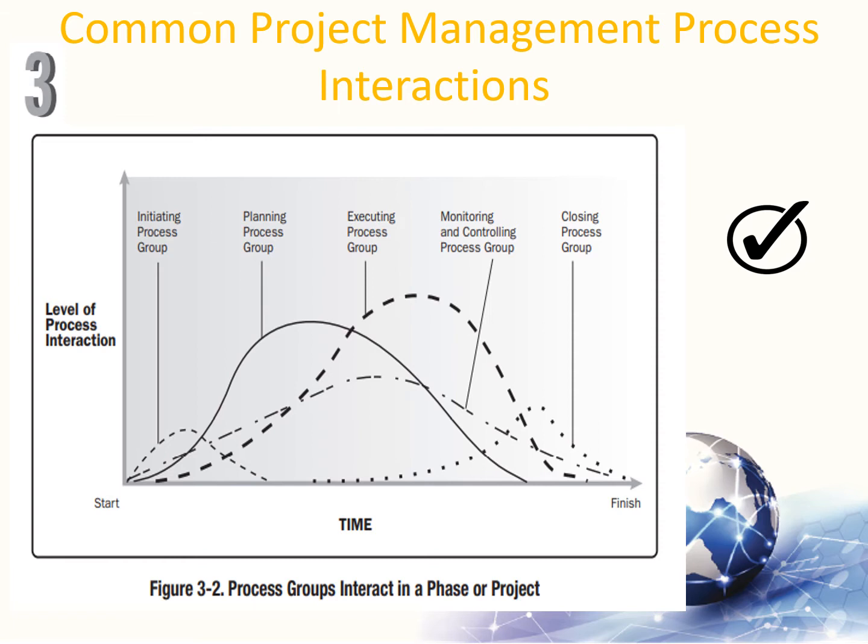An example of this interaction is the exit of the design phase, which requires sponsor acceptance of the design document. Once it is available, the design document provides the product description for the planning and executing process groups in one or more subsequent phases. When a project is divided into phases, the process groups are used as appropriate to effectively drive the project to completion in a controlled manner. Actually, in multi-phase projects, processes are repeated within each phase until the criteria for phase completion have been satisfied.